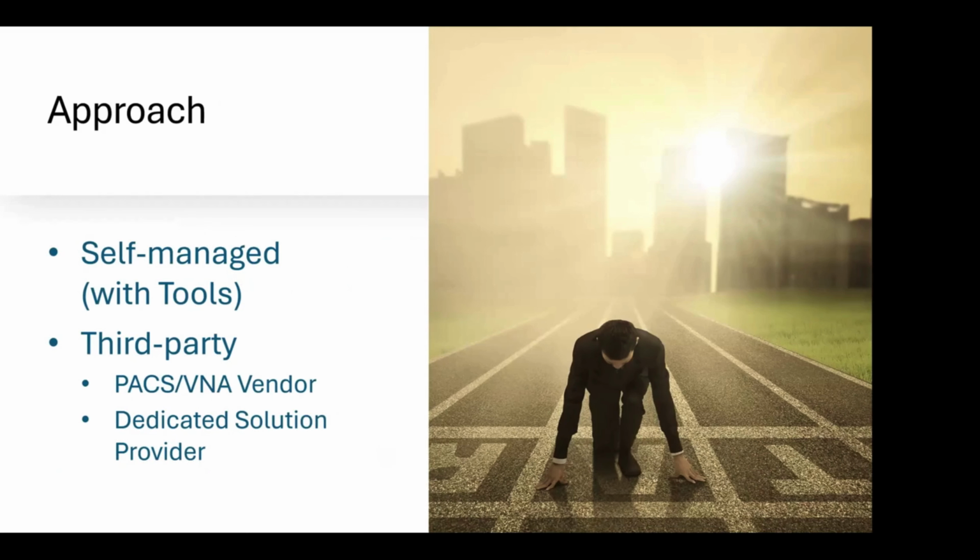The next step is typically understanding the approach. So are you going to be self-managed with tools? For example, if the new system you want to migrate to has data migration tools which your staff is trained on, are they going to manage that themselves? Are they going to license some tools and do it themselves? Or are you going to outsource this, which is typically more common, but that may be outsourced to the destination system vendor, like the PACS or VNA vendor, who may themselves subcontract it to a specialist who just does data migration, or you may contract with a dedicated solution provider who does these types of data migrations.